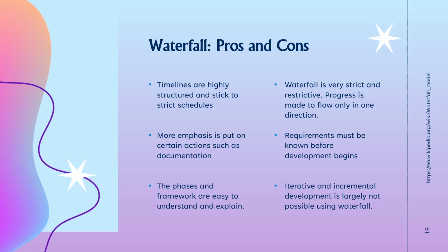Waterfall relies on the fact that you know the requirements before development even begins. You need to know all the requirements. So you can't really do iterative and incremental development using waterfall. But as I just showed here, the phases and framework are really easy to explain.